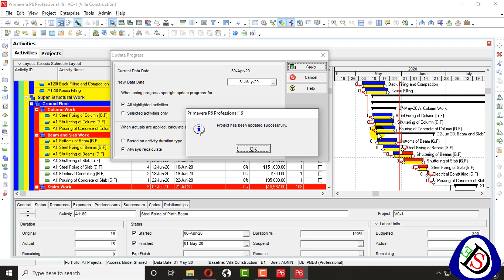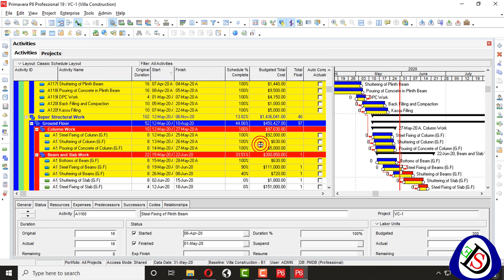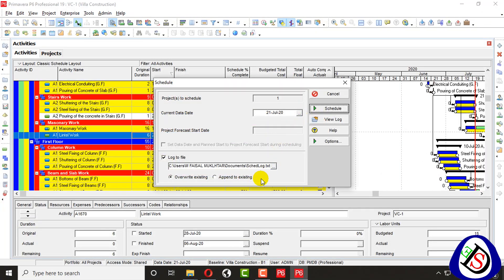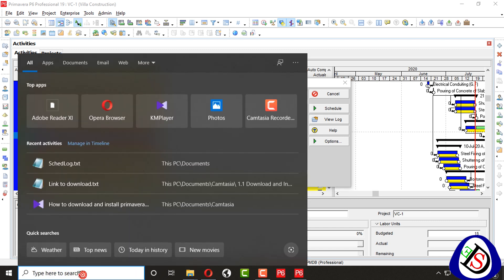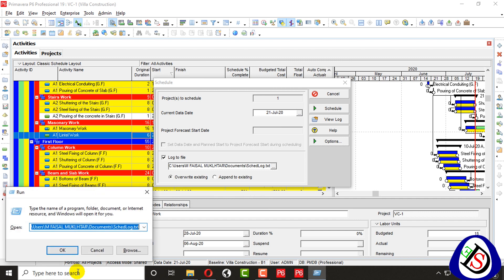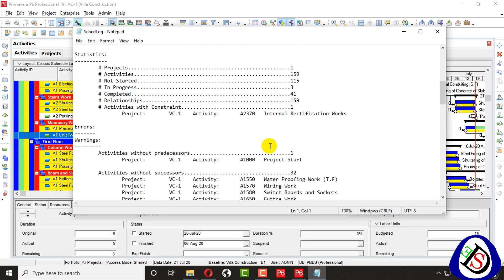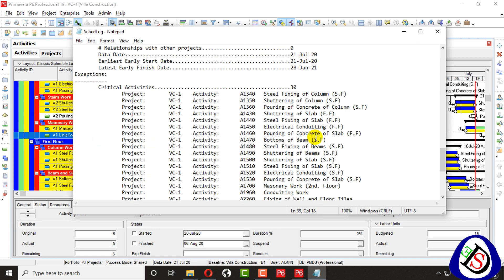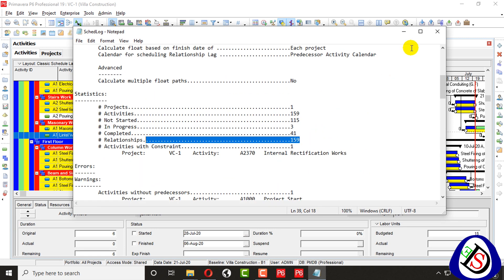When you go to Tools and Update Progress, you see 31st May — all highlighted activities apply. You can see all the activities are applied and completed. In the log you can see 115 activities not started and 41 completed, with 159 relationships. The log shows the changes.